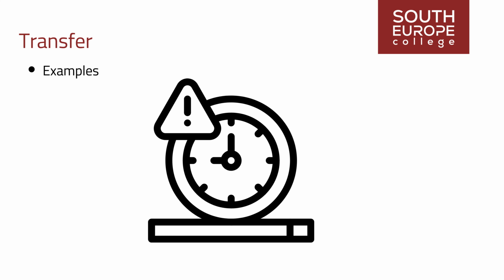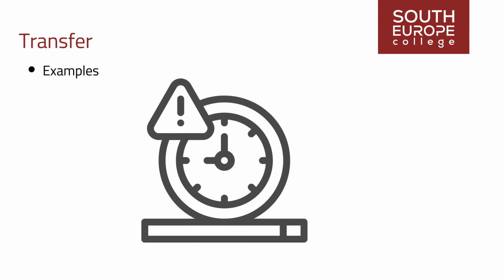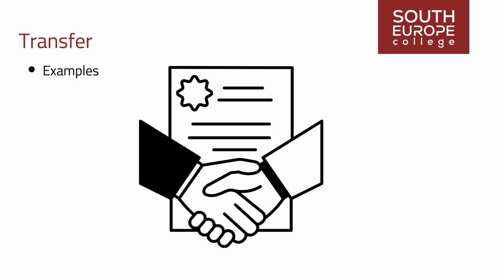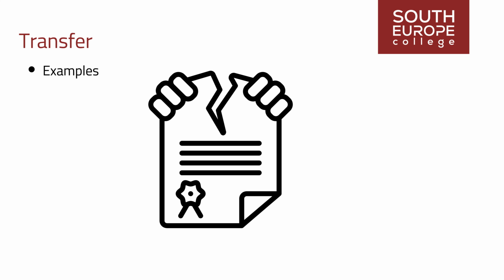unavailability of key personnel with specialized skills. To transfer this risk, the project manager contracts a third-party consultancy firm specializing in the required skills, ensuring continuity of expertise even if internal team members become unavailable. Example 3.